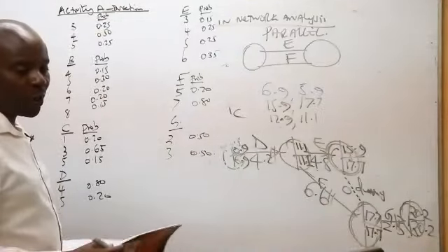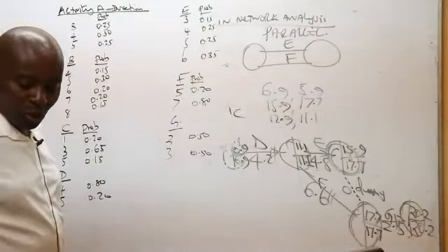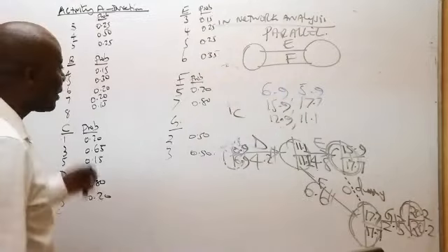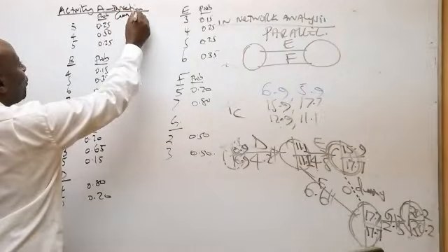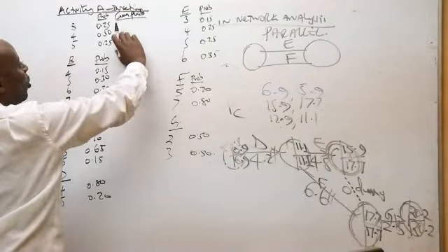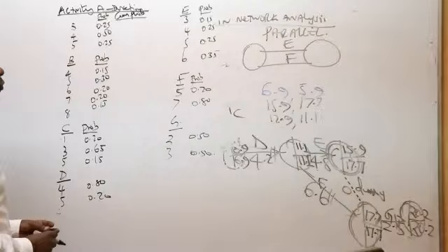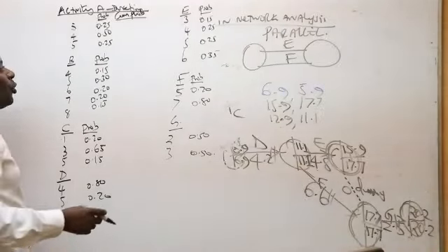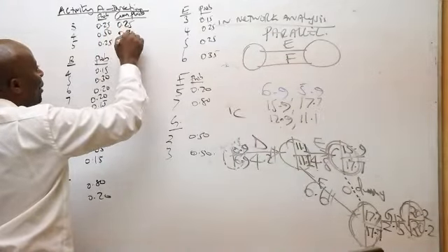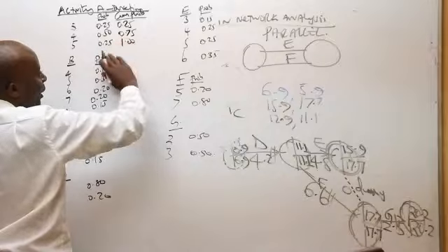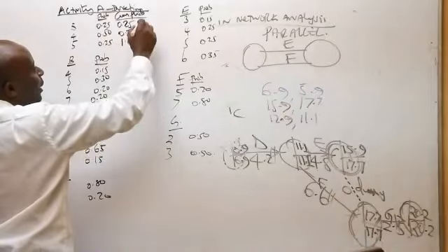Those will always be given by the examiner. What you need to do very fast is give us the cumulative probabilities, and then later create a column for random number ranges. That is your work. Perhaps I could guide you to do the first one. The cumulative will be 0.25, 0.75, 1.00. That ends there.